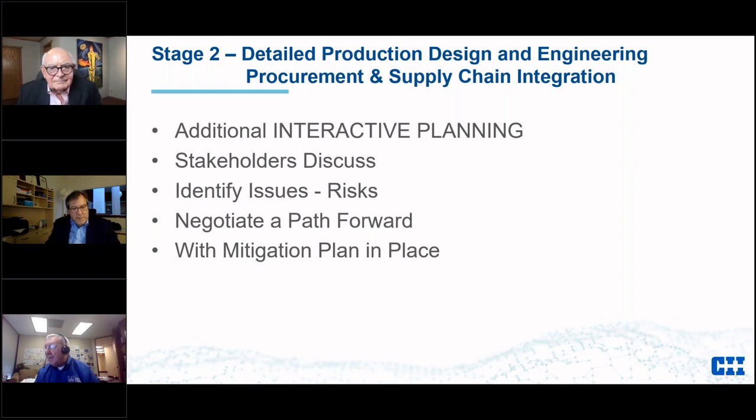So that procurement supply chain is really critical. And the killer is when the owner wants to buy things and his procurement team has no stake in that project. And I'm seeing that happen more and more. If the procurement guy does not have a stake in the project, you've got a real mitigation problem and your schedule is going to get blown all over the place. And there's really not much you can do about it, unfortunately.